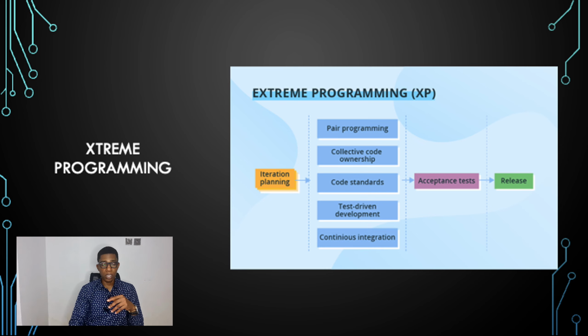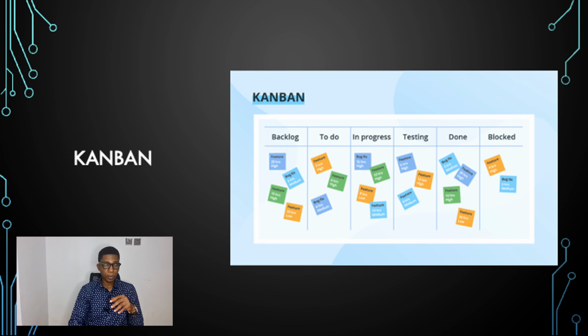And the last one we're looking at is Kanban. They are extremely short daily sprints. Instead of emphasis being placed on planning, visualization is emphasized, so the team uses a Kanban board. A Kanban board is a board that can be used to track tasks. It provides a clear representation of all the project activities, their number, responsible people, and the progress. Such increased transparency can help to estimate the most urgent tasks more accurately.